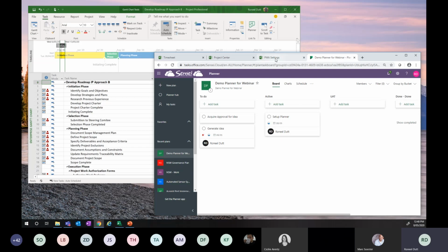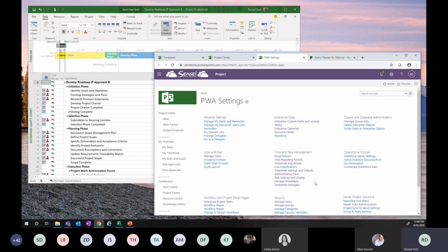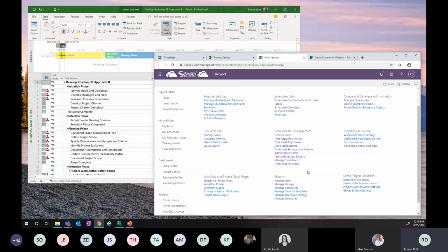Something else I wanted to quickly touch upon was timesheets and just the way you can report time on timesheets. You could either plug in X number of hours against X number of hours planned. Alternatively, you can do percentage task complete, or you could also just use the timesheets to do a combination of those, and they all get driven from a whole range of time and task sheet type management functionality that sits under the hood.